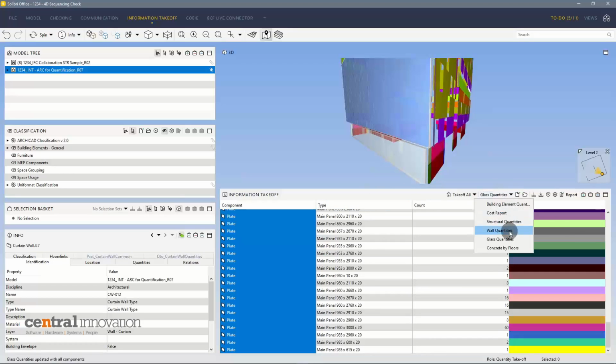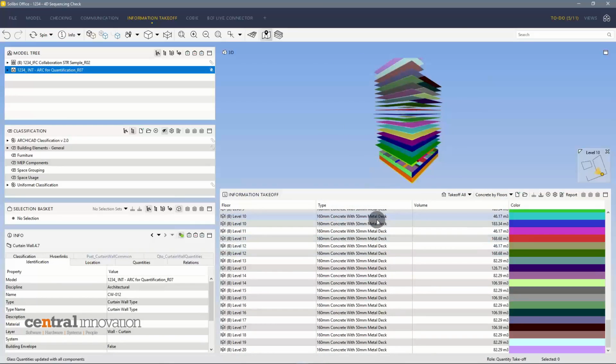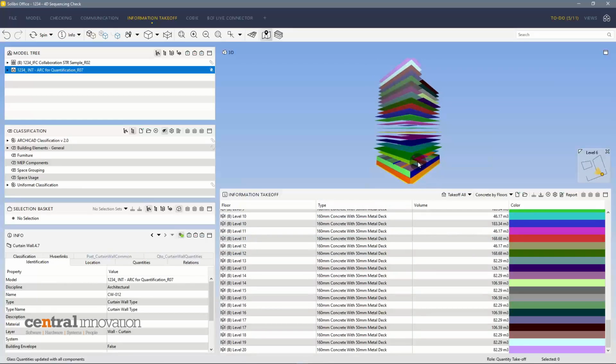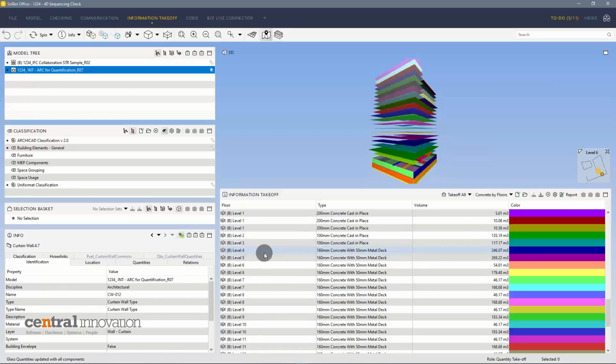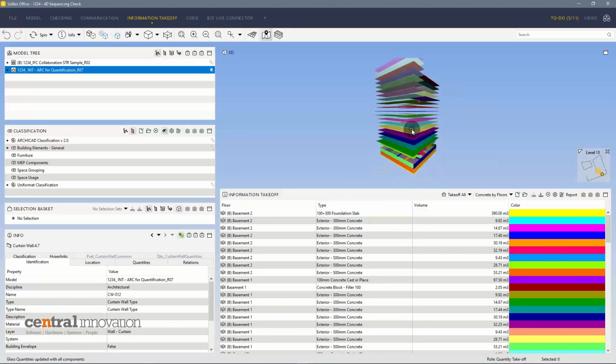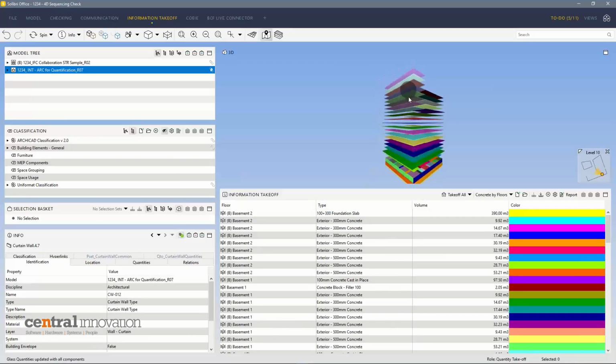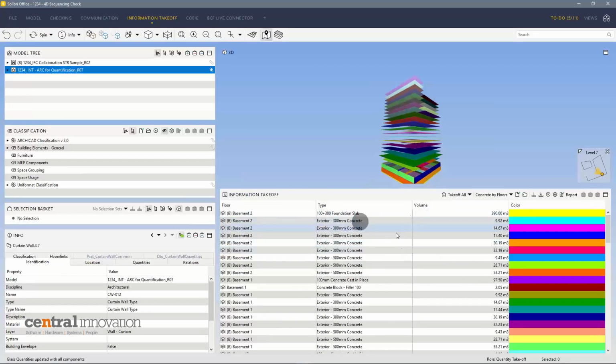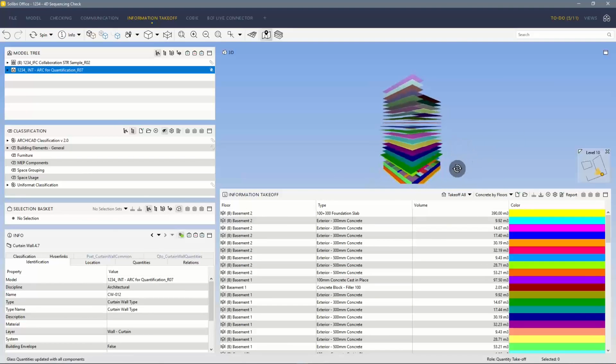And the second thing, as I have demonstrated with this, say the concrete, you can also derive this by the type of concrete and different concrete strengths. Which is not exactly what I did. I decided to do it by the level, but it will be the same if, instead of having types, I have the material. Then what you'll get in there is a list of different concrete strengths that you can quantify with a certain additional ordering list, like the floor or maybe the type of element. And therefore, material will also be used for the sake of quantification, probably one of the most important things, because of course, you need to know what it is that you're pricing in there.